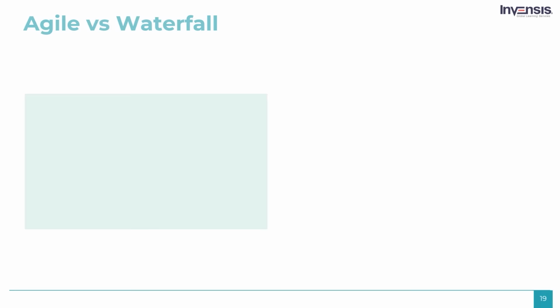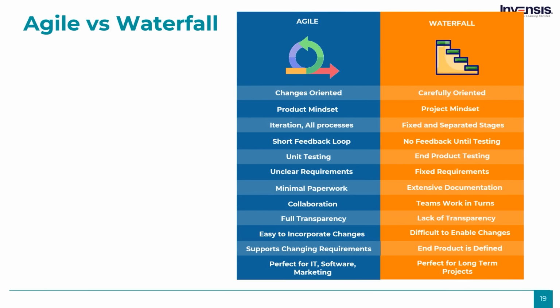Here we go. The Waterfall methodology incorporates a stepwise approach to project development. The project's progress flows downward through all the phases, similar to a waterfall. Whereas in Agile all the phases are repeated in every iteration. In the Waterfall model, you need to finalize the requirements before initiating development activities. Whereas in Agile, changes are welcomed at all stages, so it is a flexible approach. The Waterfall model has poor visibility compared to Agile methodology, because in the Waterfall model, working software is not produced until it reaches the last phase.